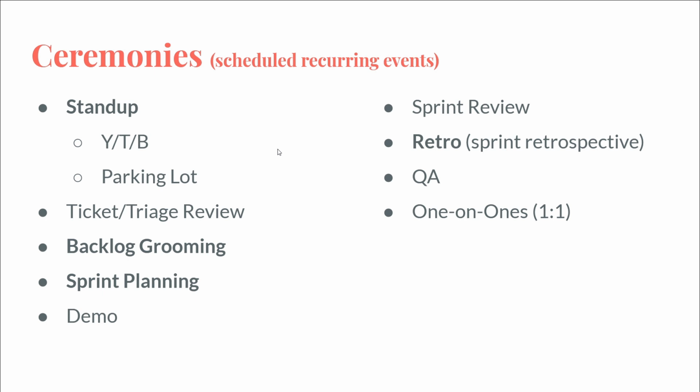That's a process thing where you can discuss and say, I realize that we've been having a lot of issues with this before, or I think we've recently had a lot of tickets that were pulled into sprints that weren't actually ready to be worked on. Maybe we should develop a definition of ready, right?